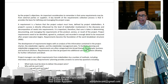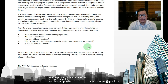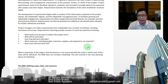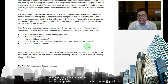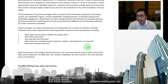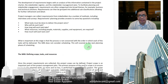Project requirements need to be identified, agreed to, analyzed, and recorded in enough detail to be measured after project execution begins. Requirements become the foundation of the work breakdown structure. The development of requirements begins with the analysis of information in the project charter, stakeholder register, and stakeholder management plan. Requirements are often categorized into broad themes — for example, business and technical solutions — and then grouped into additional subclassifications for further refinement.